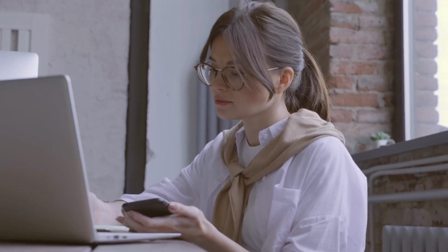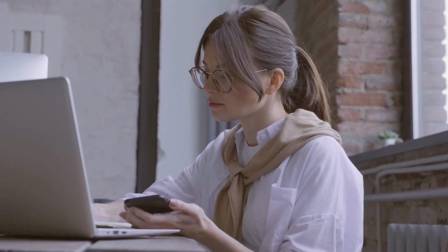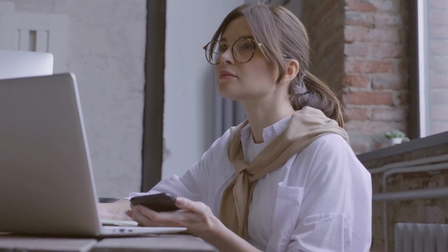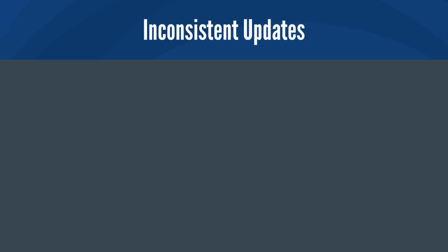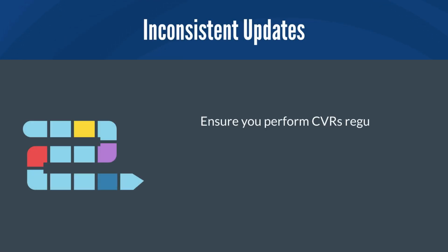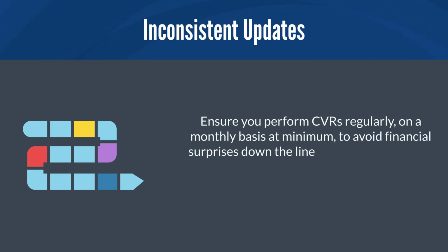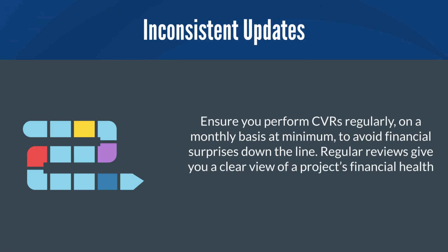Now let's explore some common pitfalls to avoid. You won't want to miss this part, so make sure to continue watching. Inconsistent updates. Ensure you perform CVRs regularly, on a monthly basis at minimum, to avoid financial surprises down the line. Regular reviews give you a clear view of a project's financial health.